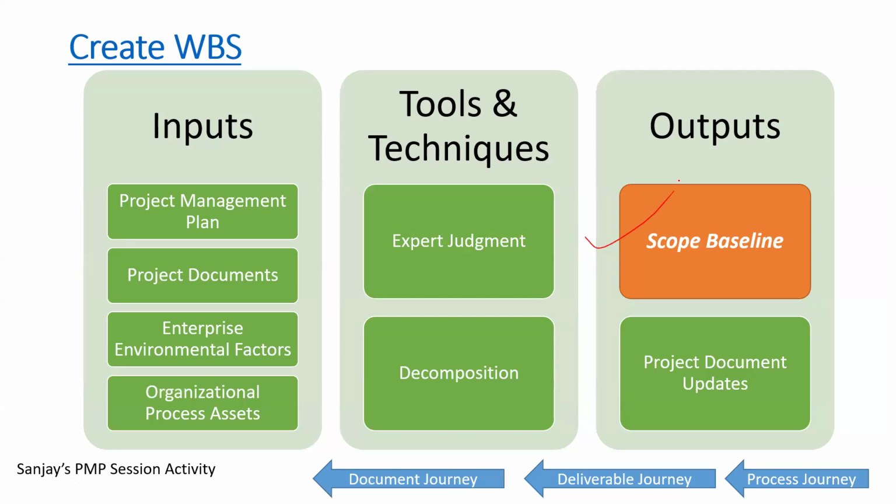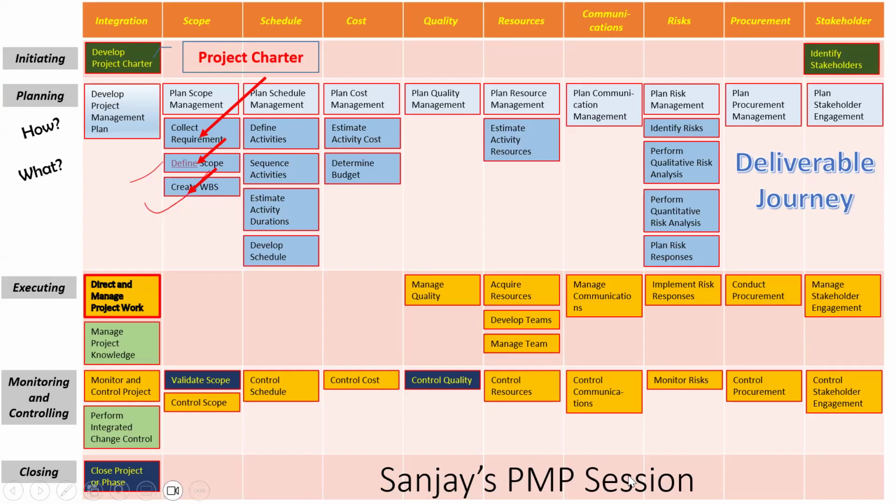Now, I will be explaining this to you. Today's chapter is in fact scope, but this is at a broad level, saying that these are the inputs. Did you notice the charter becomes a little more elaborated in the requirements, there is a border put around that, and that becomes the scope, which is then broken down into the work packages. That's called Create WBS. Is that making sense, friends?